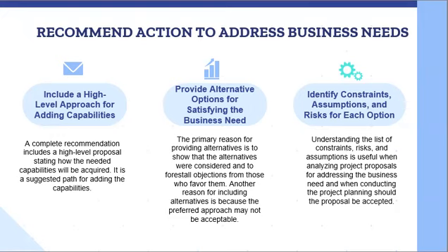Potential risks for various alternatives can have a significant effect on the perception of business leaders when selecting potential projects. Major risks for each alternative should be noted along with potential mitigation strategies and their costs. And risks that need a response may add cost to a potential solution.